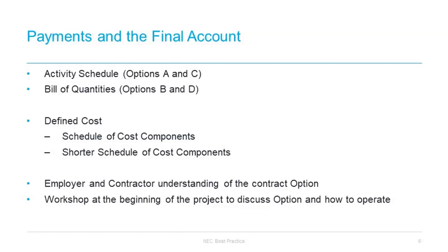This gives the contract more certainty and allows less scope for a dispute. There are, of course, situations where an element of pragmatism is required, and in some contracts, agreements can be reached on most issues as the contract runs along. However, having a good schedule of cost components at the outset gives you a really good basis for negotiations and provides a fallback position if agreement cannot be reached.